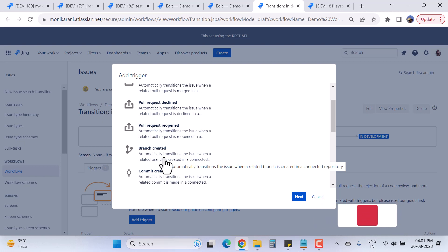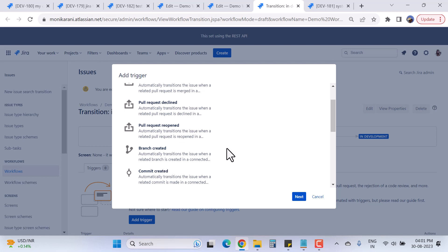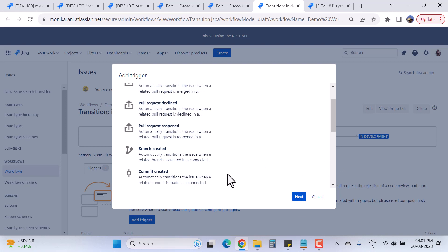This is really helpful for developers working on a story. They can simply create a branch and the issue will automatically transition from one status to another — there's no need to go back to Jira and manually change the status. Adding triggers saves the developer's time significantly.